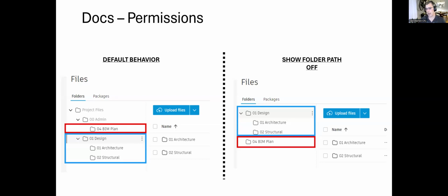We personally have earmarked the electrical, mechanical, structural, and plumbing engineering roles for electrical, mechanical, structural, and plumbing submittals in Autodesk Build. So when those submittal types come in, they automatically go to the correct person.